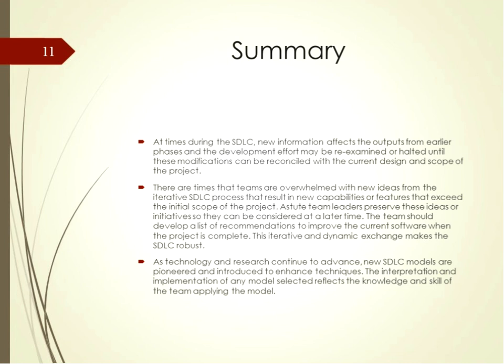At times during the SDLC, new information affects the outputs from earlier phases, and the development effort may be re-examined or halted until these modifications can be reconciled with the current design and scope of the project. There are times that teams are overwhelmed with new ideas from the iterative SDLC process that result in new capabilities or features that exceed the initial scope of the project. Astute team leaders preserve these ideas or initiatives so they can be considered at a later time. The team should develop a list of recommendations to improve the current software when the project is complete. This iterative and dynamic exchange makes the SDLC robust.